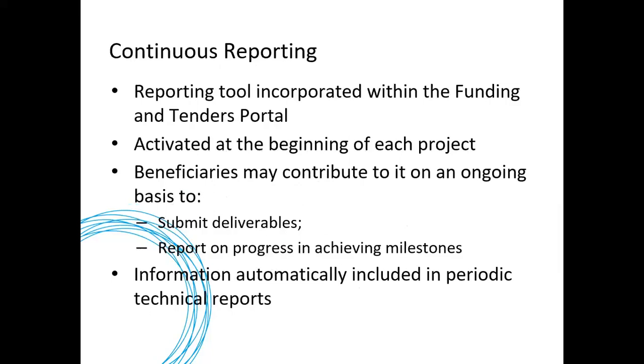This continuous reporting is also an important feature of the funding and tenders portal, because this is activated at the beginning of the project. It's activated by the coordinator, and here you have the chance to submit any deliverables and inform about any progress which you have achieved in your milestones, and this is done throughout the process of the project. So you will not have to wait for any reporting deadline to submit such a report, but this can be done anytime during the duration of the project.